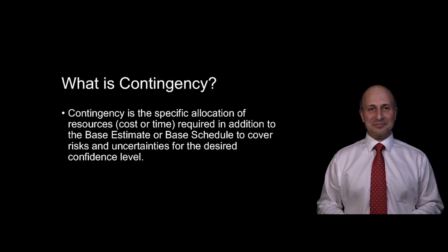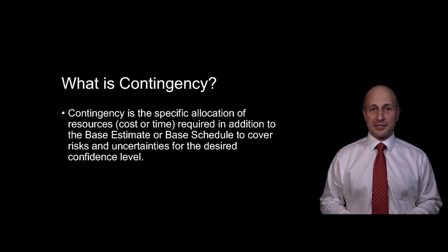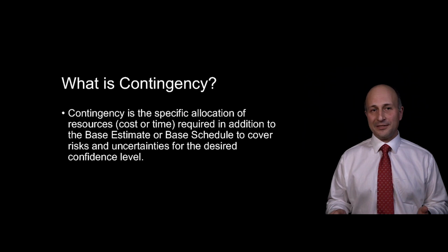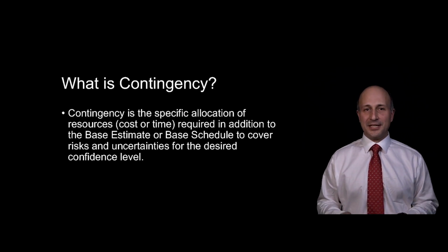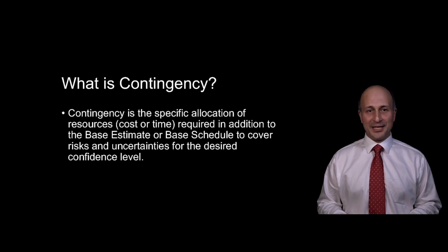Now, let's start. First, and the most important discussion is to answer what is the contingency. If the residual risk, which is the remaining risk after all cost-effective treatments been implemented, is still not acceptable, a specific amount of resources, cost or time, will be added into the base estimate or base schedule. This allowance will be used during project execution as risk or uncertainties occur. As assessment and management of contingency is integral to planning and execution of risk treatment, alignment of the two through the project lifecycle enhances the value of project risk management.